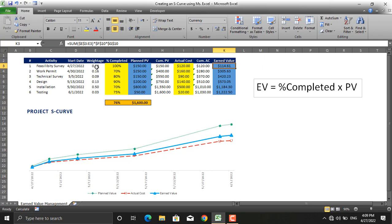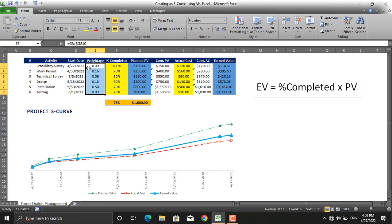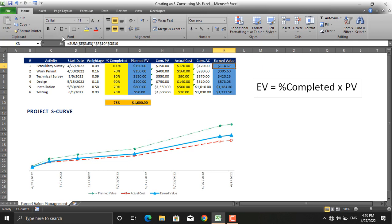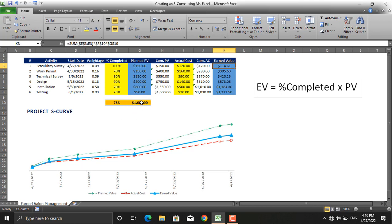For that, the formula is sum of the weightages up to this cell, or the cumulative weightages. The cumulative weightage will be 1 if you add all of them. Sum will be 1, but up to here this much of the project should be completed. Sum of the weightages times the total budget or planned value of the project. This will give you the earned values at each step of the project, for example this activity level and the next one, the next one.